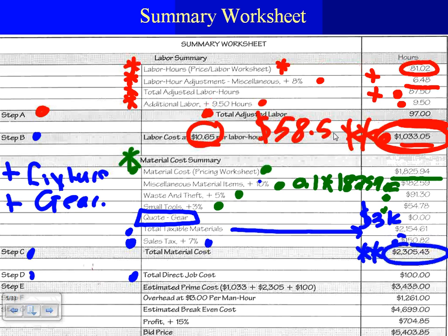What would the direct job cost be, guys? Direct job cost right in here. They threw $100. Permits, minimum permit. You need to pull a permit, minimum, right? To do the work. If it's a small job, you throw it at the end as a direct job cost. Maximum could be renting a trailer. It could be the electricity they're going to consume for this project. It could be the other rents that you need to rent, excavators. You need to rent whatever, machines.